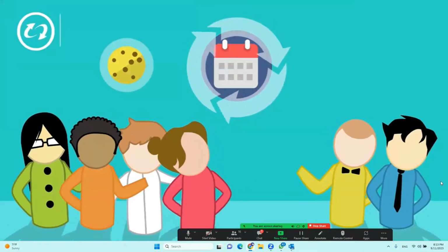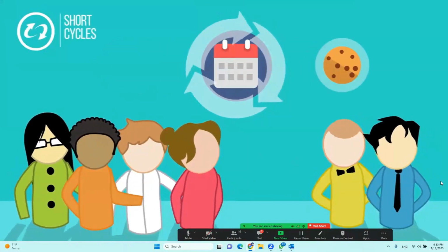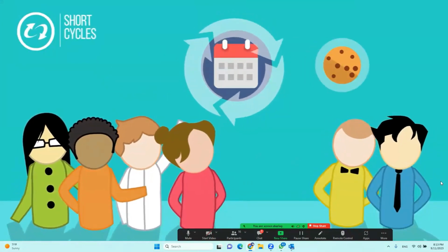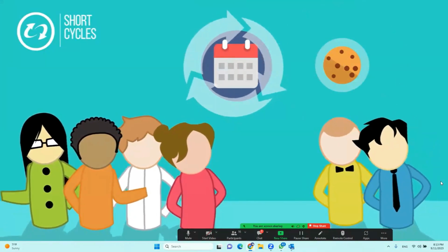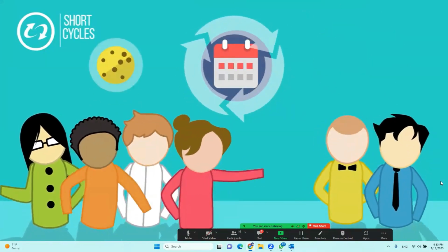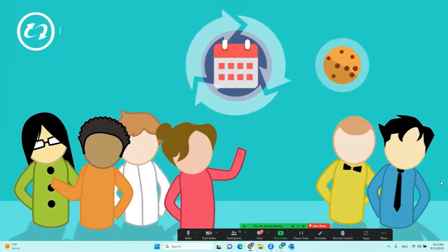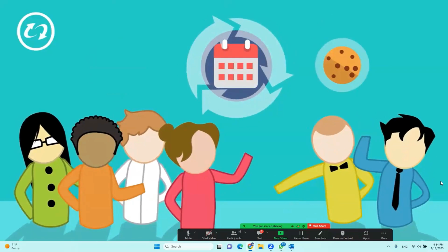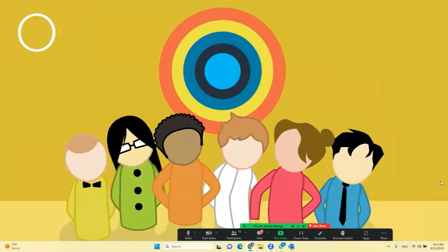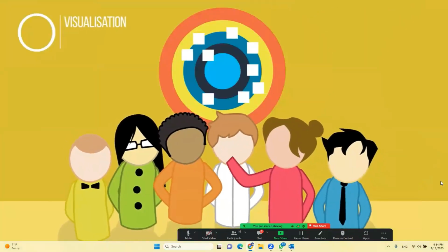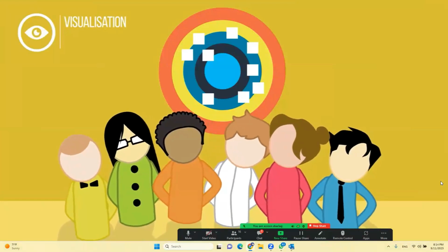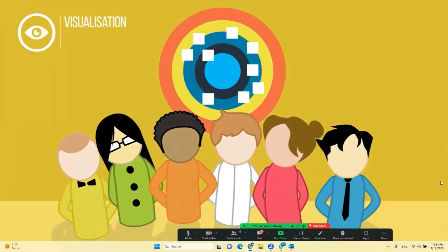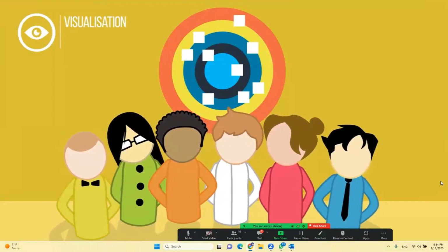Agile organizations also achieve results in short cycles. This helps teams to create value instantly. After every cycle of 1 or 2 weeks, customers and stakeholders give feedback so the team can adjust and improve. An agile team visualizes their work. Anna and her team see straight away where they want to go, how they're progressing, and what the latest developments are.